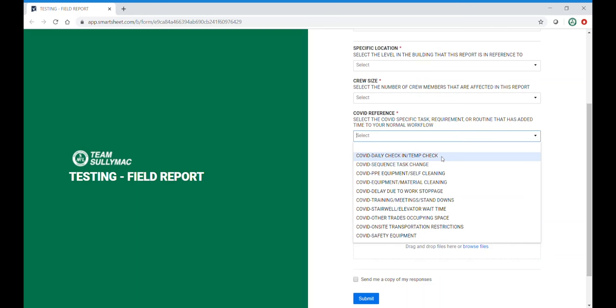Daily check in and temp check. This is going to be time that dips into shift time. Sequence task change, so anything that changes from optimal sequence and creates inefficiency. PPE cleaning and self cleaning. This would include hand washing.